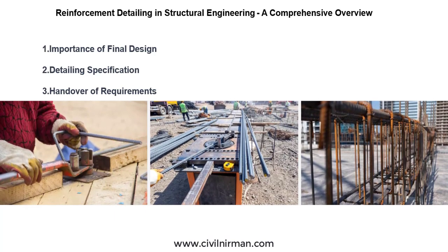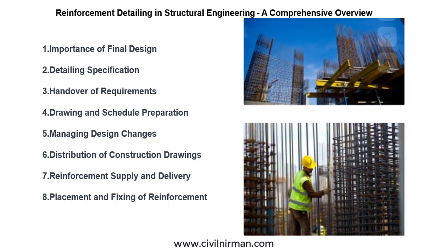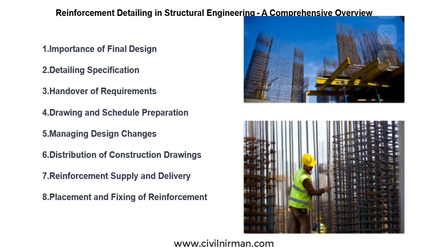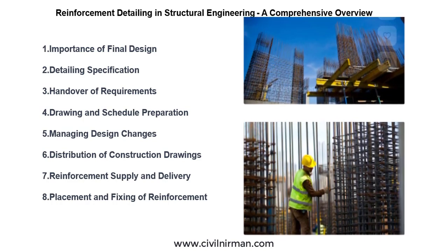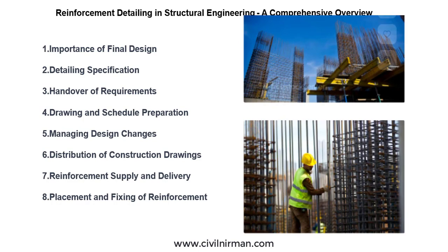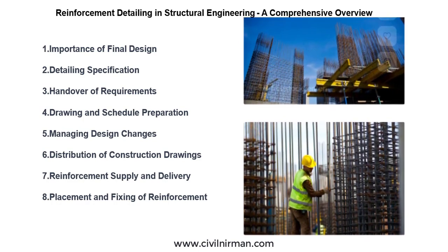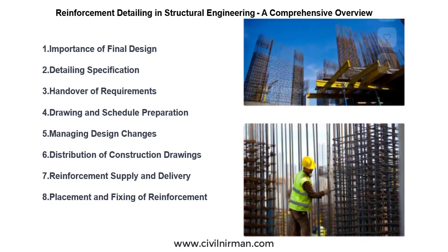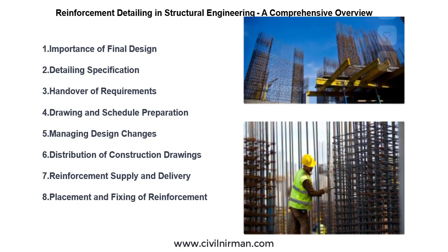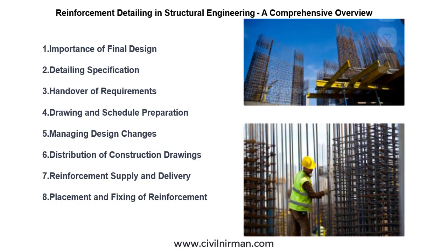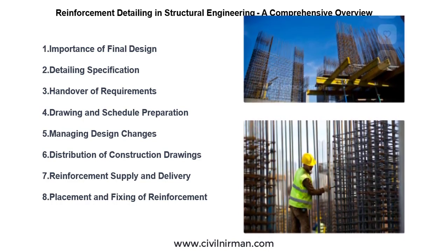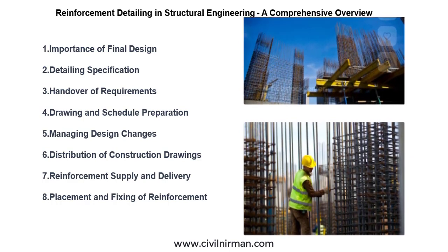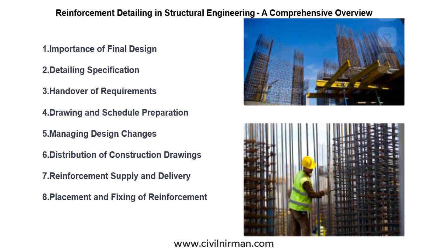Through all these processes, correct and current reinforcement drawings and schedules play a vital role in getting it right on site. The schedules also play another vital role as they form the basis for the payments to the suppliers and contractors. See, the communication of reinforcement detailing information from the design office to the site must be as efficient as possible. Traditionally, the designers have also been responsible for preparing the reinforcement detail drawings and schedules. I mean design detailing.